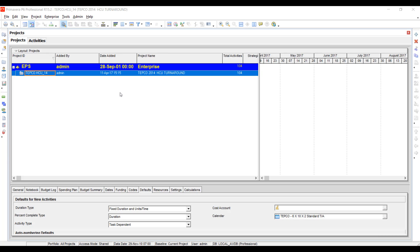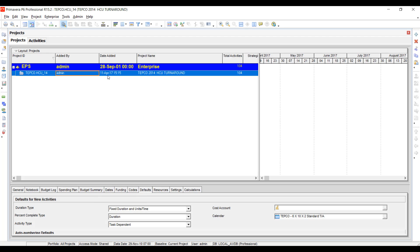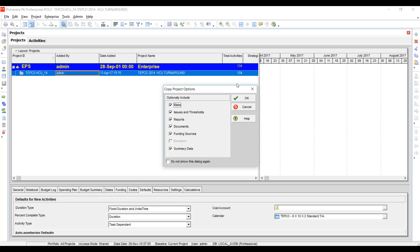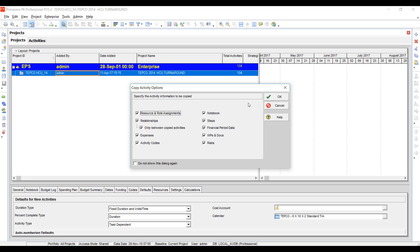Another technique you can use to get rid of all of the relationships within a project—and keep in mind, this is all relationships, so this wouldn't work if you only wanted to get rid of a subset of relationships—but you can always copy the project and then paste. You get the copy project options window first, so we'll go ahead and click OK on that one. Regarding the WBS, we're going to copy everything there as well, including the activities. We click OK. At the next window, copy activity options, we can remove the option to copy the relationships, so that's going to copy the project, all the activities, and all the activity details without the relationships. But that will apply to the entire project, and all the relationships will be gone when you're done pasting.